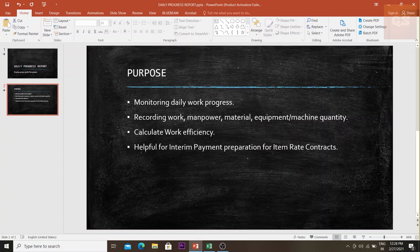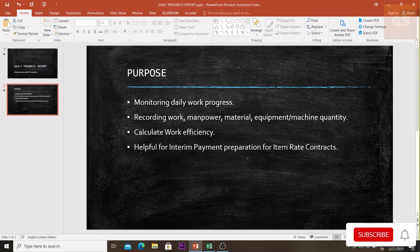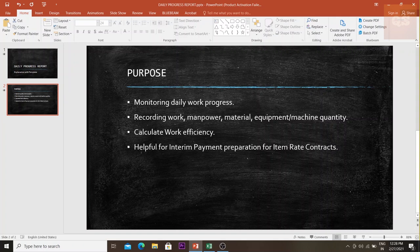The major problem was with linear items — items whose quantity is calculated in meters or square meters, such as cable length, pipe length, or cable trays. These quantities were difficult to substantiate just by visiting the site. With the DPR, all details like where the work was carried out and how much quantity was completed are recorded, so by the end of the month I could see how much work was done in each area and mark up the drawings accordingly.